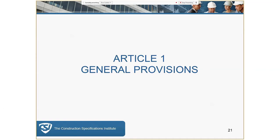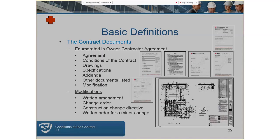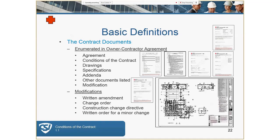Getting into the general provisions of the general conditions — Article 1 is essentially a list of the contract documents. What you do not see on that list are shop drawings, napkin sketches, that sort of thing. The contract documents do include written forms of modifications, which you'll see at the bottom of the slide. Emails might be considered a written amendment, so be careful what you put in writing.